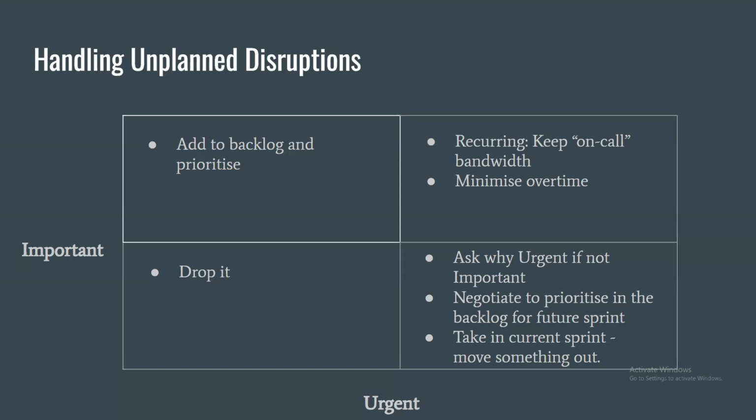And the one which I suggested to you, very simple, important versus urgent. There are many others, but essentially you will say, will it help the customers? Will it improve my customer satisfaction? Will it improve my business metric? For example, if you are building an e-commerce site, it is the number of orders or number of daily active users that you have. So if the change that is being suggested is not going to help the customer, not going to help with the business metric, not going to help with the team satisfaction, the team health metric, then you will say,